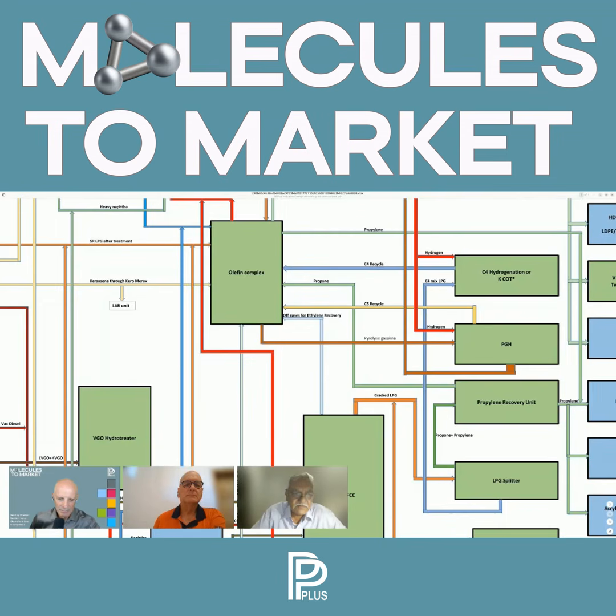So I have to go to the airport authorities to get some clearance. I have to go to coastal authorities to get some marine clearance. So many things are there. So that is a part of normal implementation. But all those things we will have interfaces. That's why I mentioned that once I select a site, the process of intervention starts. But in our experience, the government has been more of a facilitator in that. I haven't seen them obstructing anything, because I think both the governments are actually interested in the project.